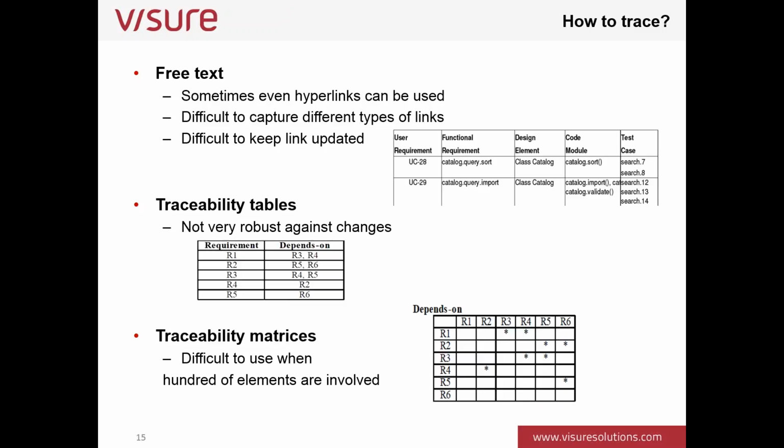This is the reason why, some webinars ago, I said that for traceability it's important to have a unique identifier associated with each requirement. By means of this unique identifier, we can just say that this requirement is related with the requirement called UR23, or something like that. So having a code or a unique ID helps us in creating the traces.